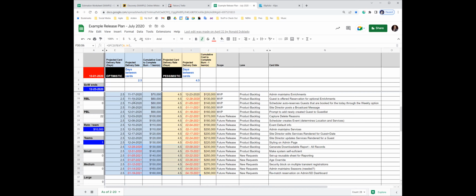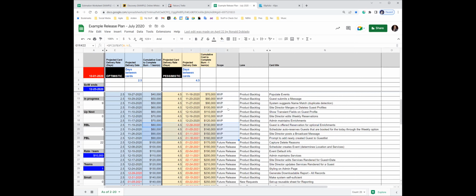This is really what I manage. I manage the middle. Most of these will probably get done, but some of them won't. So let's talk about that. And so if I'm looking here, they're actually looking pretty good for MVP, but I would really be talking about, all right, these three, can I break any of these down? Can I deprioritize any parts of these to move these up and be a little bit more sure that I'll